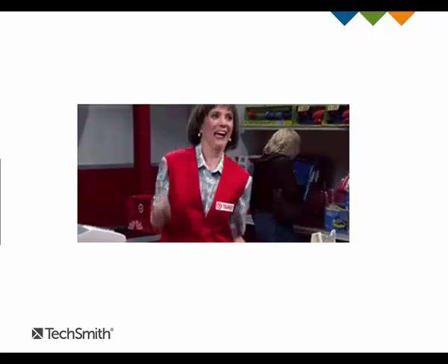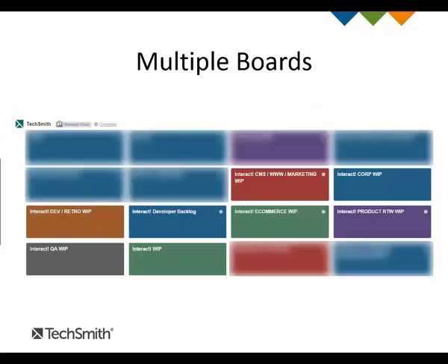So first up, the multiple boards. We didn't need a script for this, we just did this. We went from our one huge WIP board to having our Interact WIP board still with just requests. Then our slices are dumped out to our 6 subboards, and then they are brought back together on our QA board to finish moving through the published process.